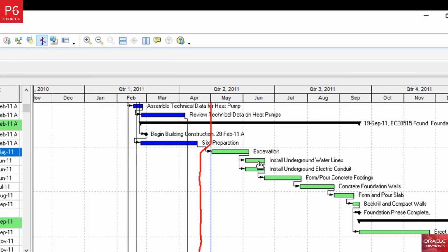The activity bars look like rectangular boxes, and some of them come in different colors. For example, mine here is showing blue. Depending on the layout you are using, the colors will indicate something in your Primavera P6. These ones showing blue simply represent activities that have been completed. That's essentially why they are showing blue in color.